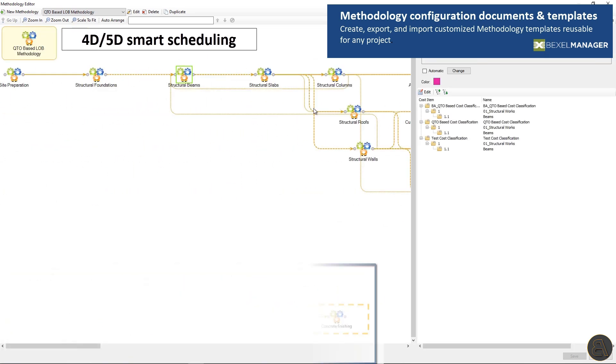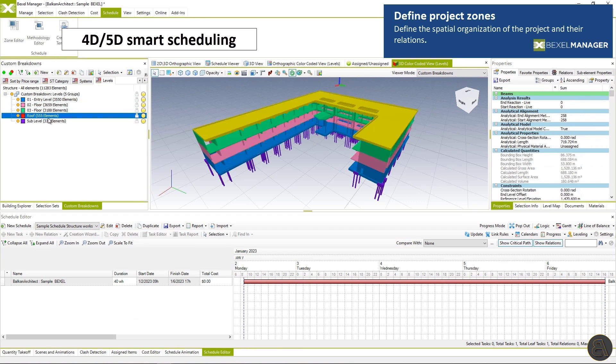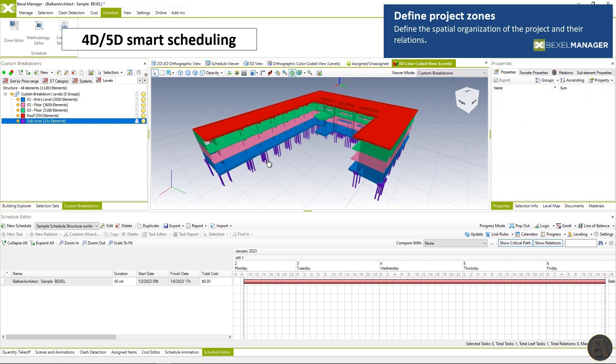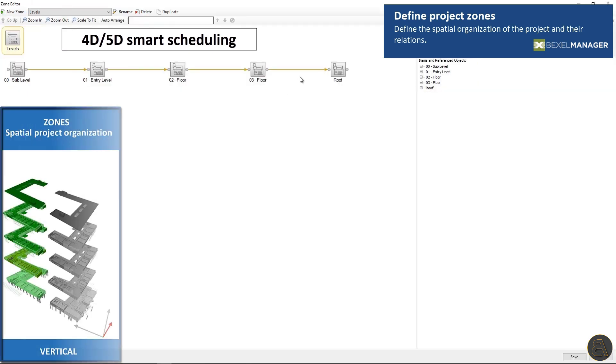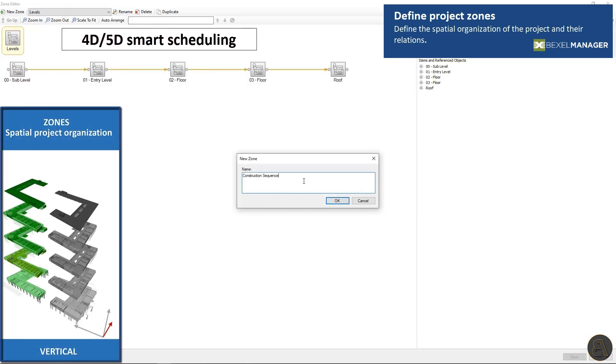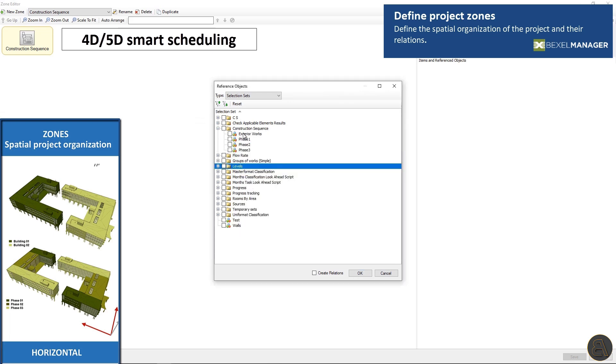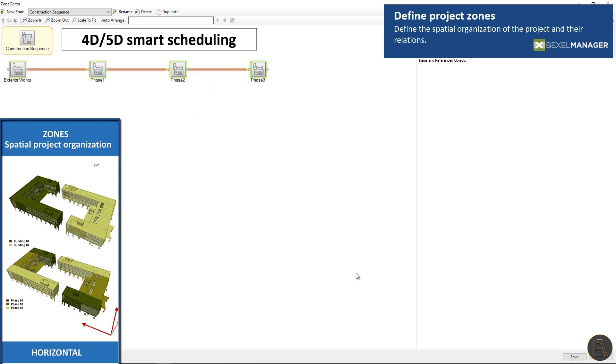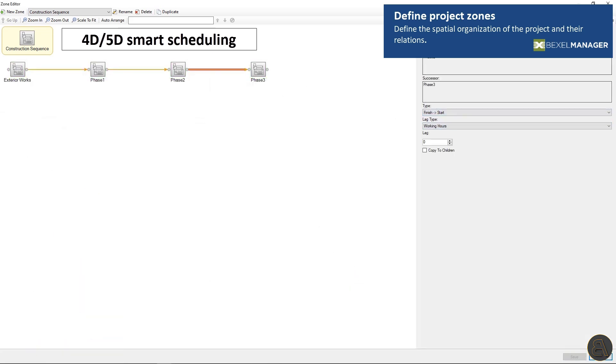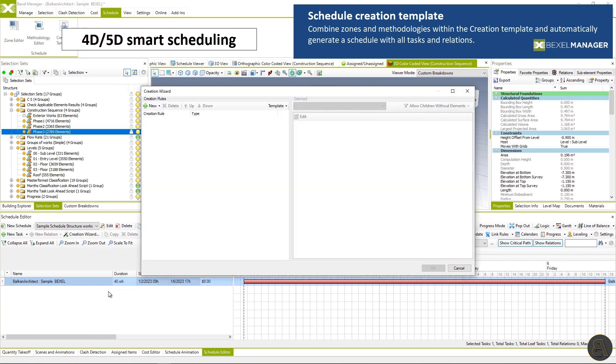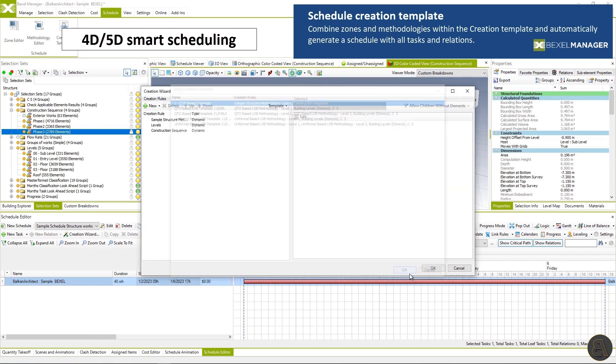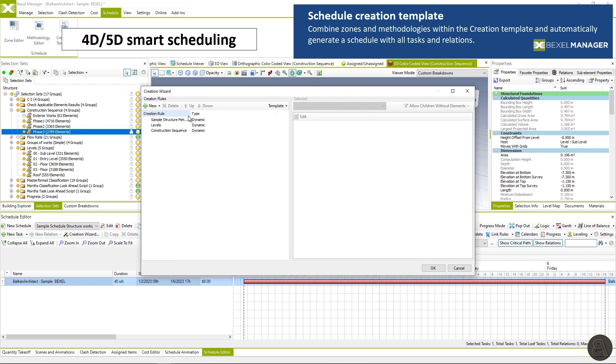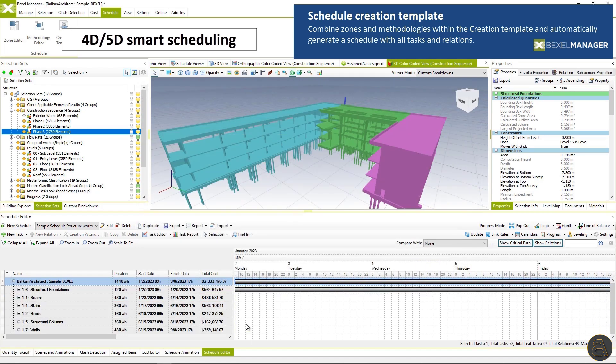Zones are a spatial organization of the building. Elements of the building can be distributed horizontally and vertically and zones will use the spatial distribution of elements and create relations between them. Combine zones and methodologies within the creation template and automatically generate a schedule with all tasks and relations. The whole system is BIM based and everything is linked to the model elements.